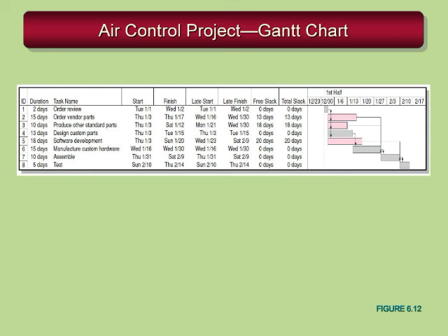More importantly, you see the free slack, or the slack available on individual activities, represented by the line that shows between the particular activity and the next activity it connects to. So looking at the pink bars in the Gantt chart, you can see there's a bit of space there that can be used to manage the project and manage these activities.